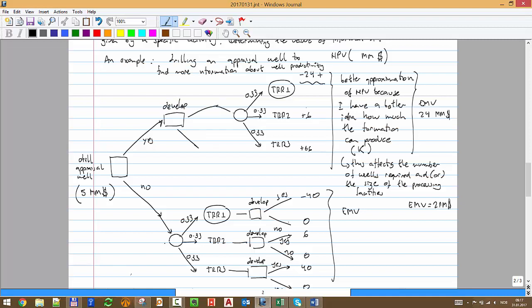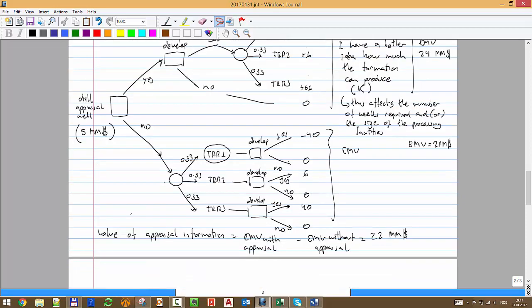Okay, yes or no. Okay, and this is the one that has 0 value. But it's going to give you exactly the same. The estimated value of the branch is just the probability times the value of that particular option. Okay, exactly the same for the other case. But I think it's less messy, and it keeps the logical sequence in time of events.